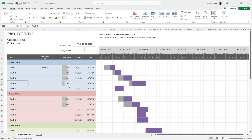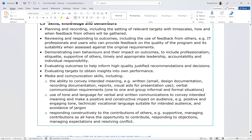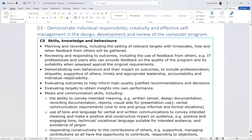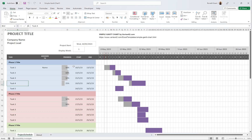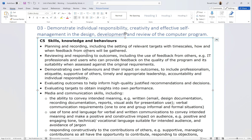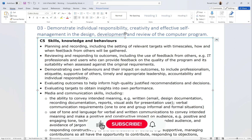All that first point is asking is: have you planned and recorded, including setting relevant targets with timescales? It just means you have a sensible Gantt chart you can follow — it does not need to be complex. Your Gantt chart can also show when you're going to get feedback from people. For example, after completing your design you put a section in the chart that says 'get feedback' — one day, two days, however long it took — and then 'work on feedback.'